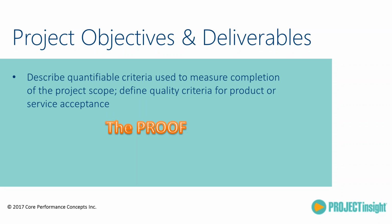This goes back to the charter. It's not a one and done, because what success looks like from day one may change a little bit as the project gets more clarity. So yeah, review and revise that often, and get those measurements, acceptance criteria, quality criteria. Speed of the website might be a quality criteria, for example.